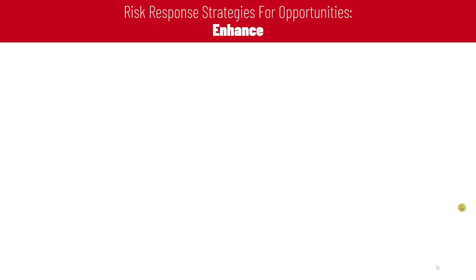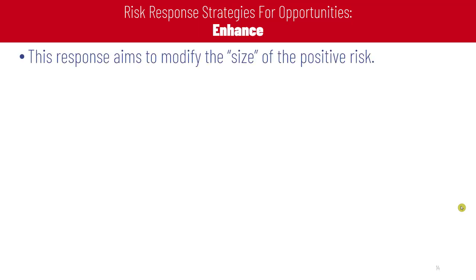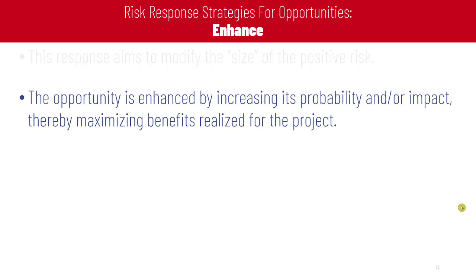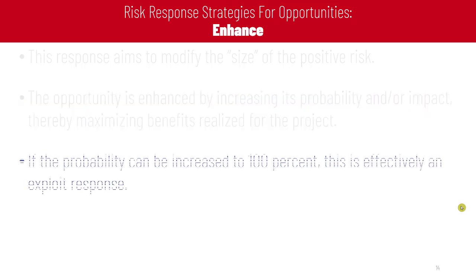The third risk response strategy for opportunity is enhance. This response aims to modify the size of the positive risk. We will change its size. The opportunity is enhanced by increasing its probability and/or impact, thereby maximizing benefits realized for the project.